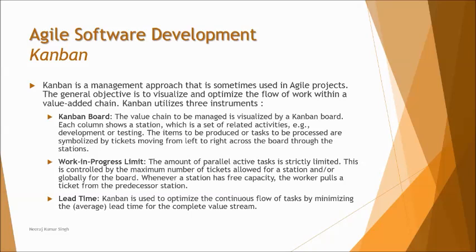Kanban is another unique agile approach with three key entities: Kanban board, work in progress limit, and lead time. The Kanban board showcases the monitoring process for ongoing activities, with four columns: to-do, in-progress, verify, and done. Tasks move from the first column to the last, and the board is transparent to all team members. Team members are self-oriented, deciding which job to take next without being directed.